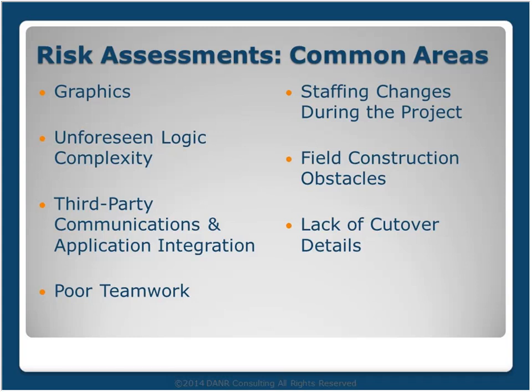And just one more point on this slide, and that is that cutovers are probably one of the highest risk areas for any kind of automation project, when you're actually cutting over live, especially if you're doing it hot. And so really doing detailed planning around that early in the process can be extremely valuable because I did a project a few years back where we spent a tremendous amount of time doing detailed cutover planning early in the process.